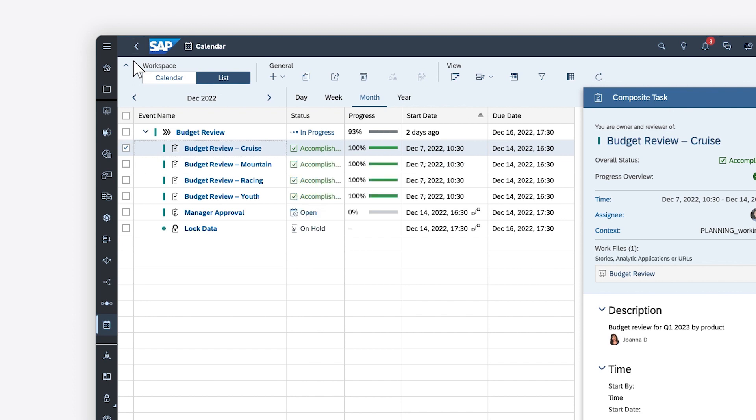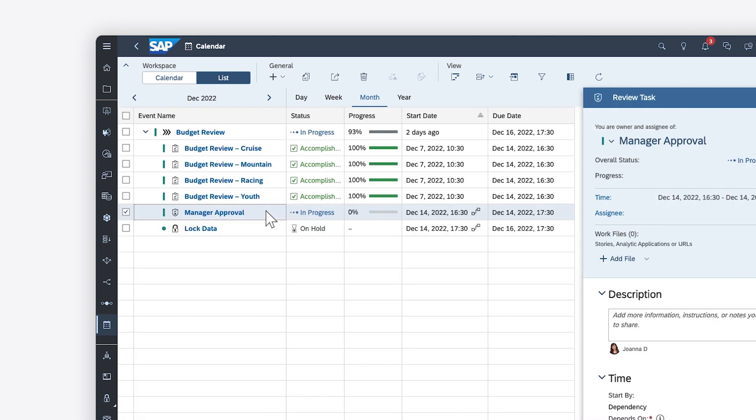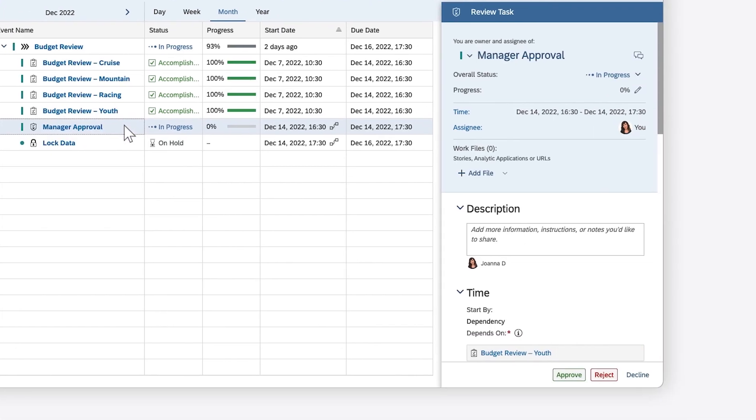Once all the tasks that require data entry are complete, the review task is activated automatically because its activation is based on dependency rather than a specific date.